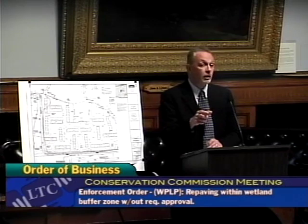All right, so now, going forward, Joe, and I don't have a copy of the enforcement order in front of me, but my recollection is that they were to appear, but also there's verbiage in there to file with us. Yeah, within 21 days. Right, and I know you were using this opportunity tonight to get a sense for how you wanted to go, but going forward now, you need to file a notice of intent. That's correct. We've prepared the draft of the NOI, we've prepared the draft of the O&M plan,